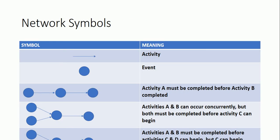Regarding network symbols: an arrow shows the activity, while nodes show the event. In the third row of the diagram, there are three nodes and two arrows sequentially, where node 1 is initiating and node 3 is completed, and the two arrows show that Activity A must be completed before Activity B. In the fourth row, there are four nodes and three arrows, where two arrows from two initial nodes converge on one node, and then one arrow leads to another node.